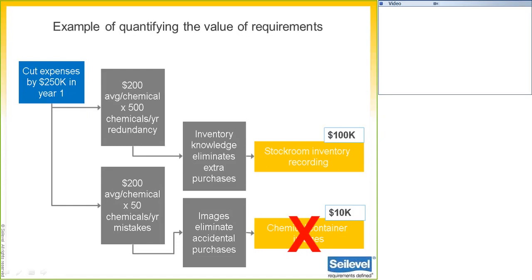One of the metrics that we'd like to point to is that it's pretty interesting that only about 65% of features are really ever heavily used in software. So this is a lot of excessive cost that's used to drive features into the market that really are very rarely used. And so using objective chains is a great way for you to help avoid building the things that you don't really need to include. We also do a training exercise in one of our classes that demonstrates why this goes wrong so often, why the prioritization exercise goes wrong so often.